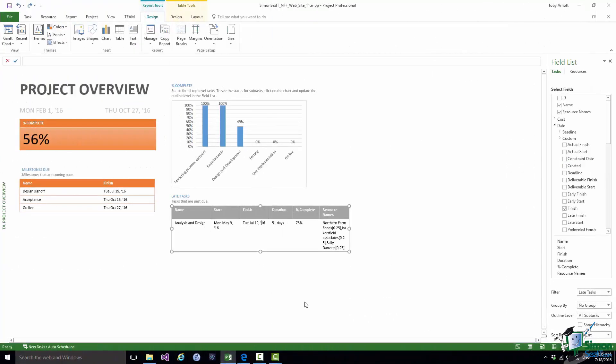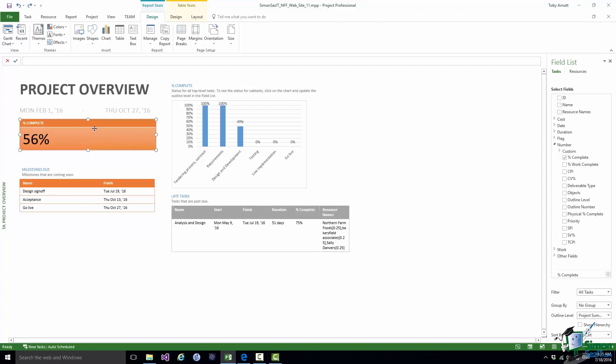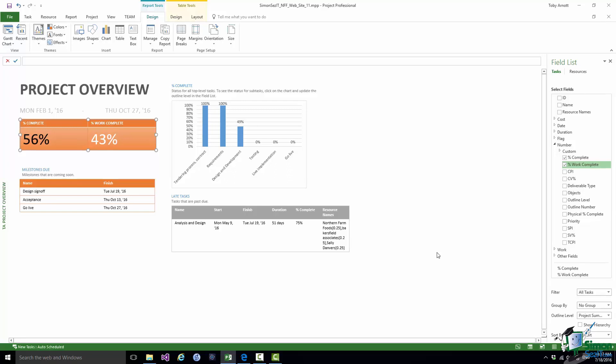So working on that principle, if I went back to the table that contains the percent complete and decided that what I really want to show in my Project Overview is not just percent complete but also the percentage of work that's complete, because percent complete refers to the amount of time that's complete. If I go to the field list, check percent work complete as well, I have a second column in that table. It makes my Project Overview just that little bit more informative. Now the fact that I've used 56% of the time to do 43% of the work doesn't necessarily mean that I'm behind schedule, because the work may not be evenly distributed over the time. But those two figures together can often give a quite important message.